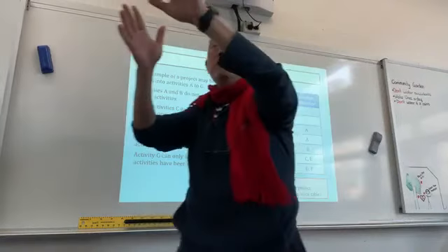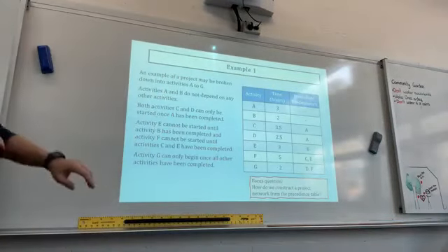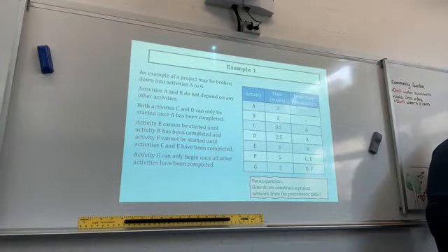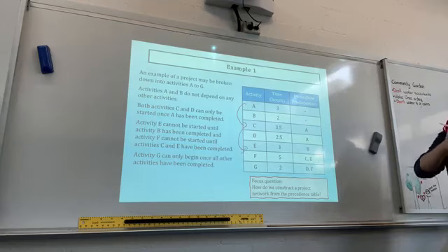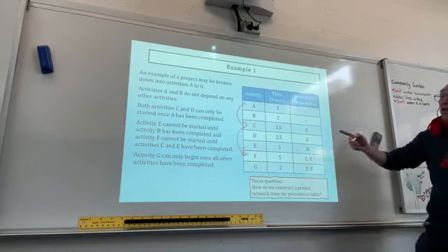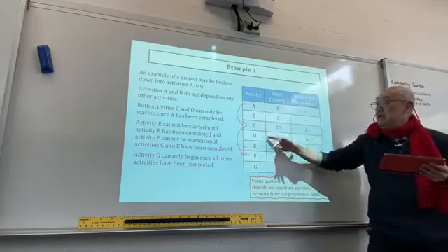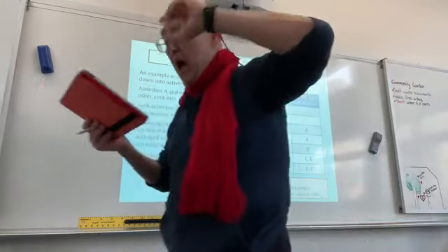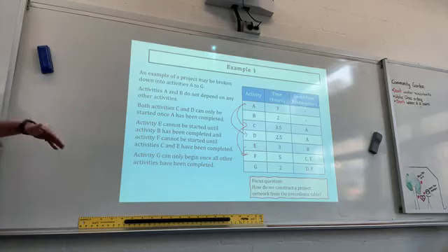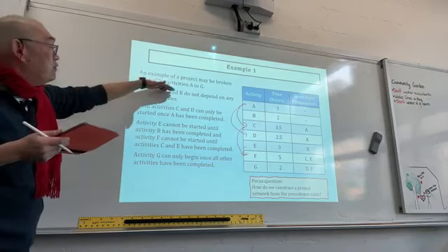So you can see that it goes from one to the other. You could follow, this is sort of like an arrow from A and then to C. And then C is a predecessor to E. All right? Oh, sorry, not C, C is a predecessor to F. My fault, wrong one. All right? And E is a predecessor to F. And then you know that B has to be before E. A also is a predecessor of D. So you can see from there how you could more or less line up your project network from the top to the bottom. All right, which line you could follow.